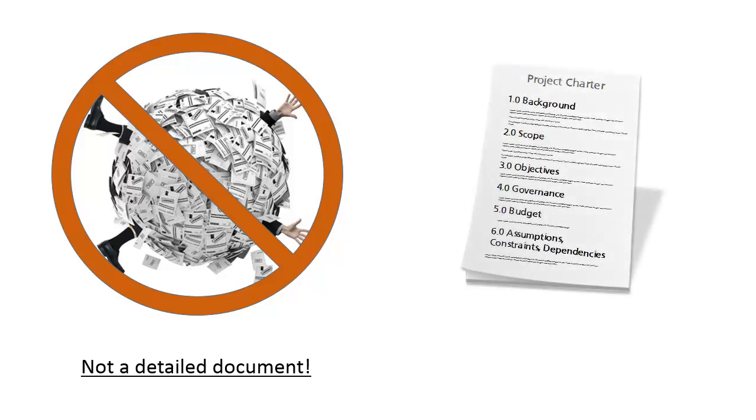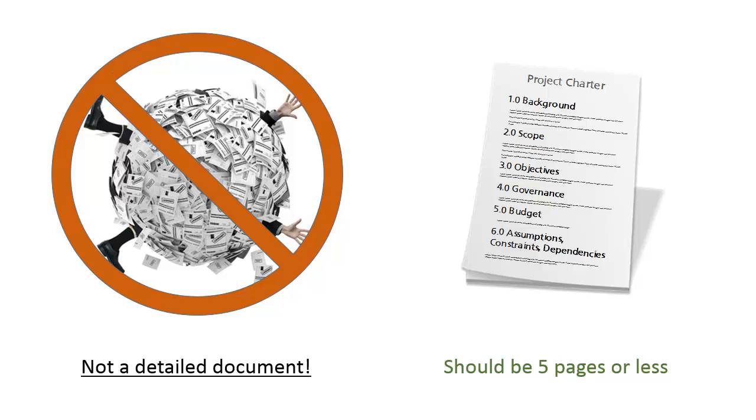A good charter should be five pages or less. Yep, you heard me. Five pages or less. And I would try to keep it more on the less side, if you know what I mean. If someone can't read your charter in a few minutes, it can't and most likely won't do its job.